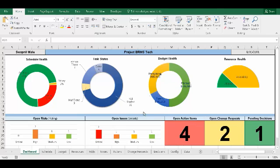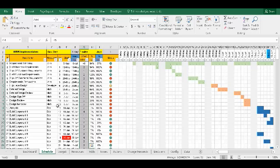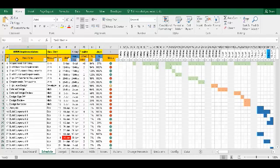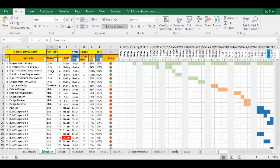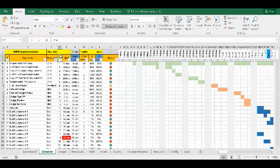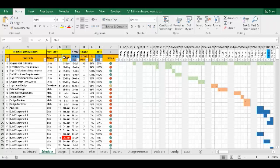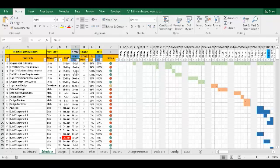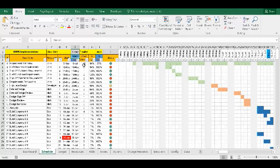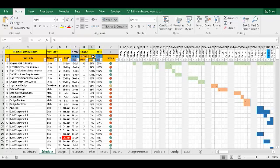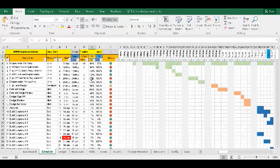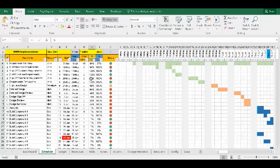And moving on to the schedule tab. It has a traffic light indicator, task names, and task numbers. It's pretty self-explanatory. The resource comes from the resourcing sheet. There's a predecessor column if you want to add a predecessor. There's a start that you need to configure and there's a finish which is auto calculated. It is based on start date and effort that you put in. There's an effort column. There's an actual column which is the actual progress so far. So this is the data that you should get from your business analyst and anybody working on the project to note the latest progress. Then there's the days planned which again is auto calculated.